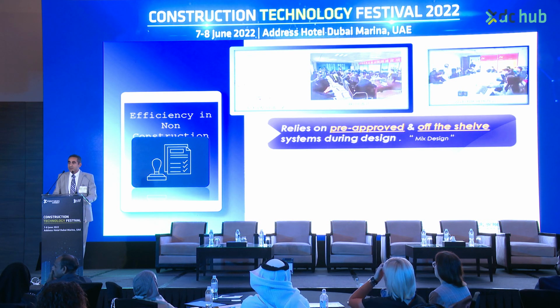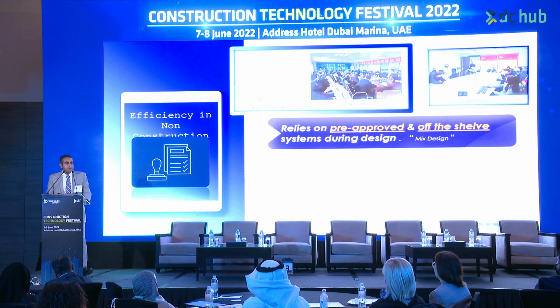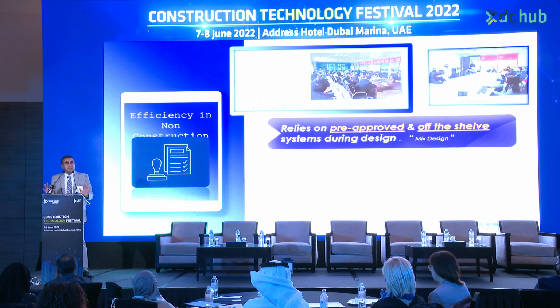A couple of years back, I visited Serbia. Over there, they have only 6 mix designs across the entire country. These mix designs are the only ones approved by the authorities. All the suppliers know these mix designs. Consultants have to use these mix designs in their design. So there is no mix design approval.